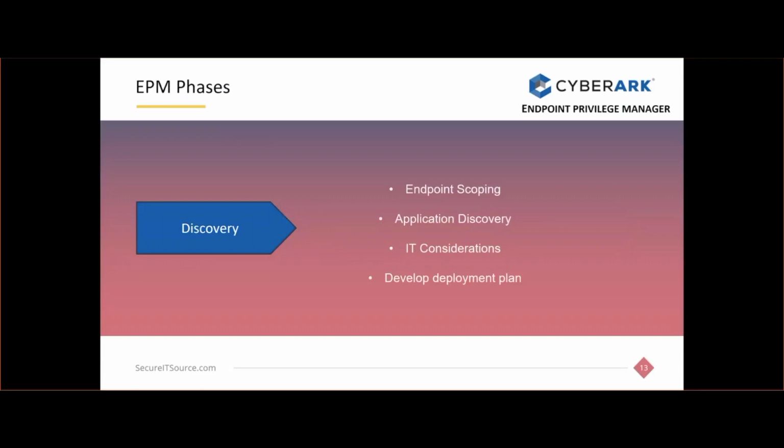We want to do application discovery, super important. We want to know exactly what is being used in the enterprise. A lot of folks are aware of maybe some high-level applications, but this is where we get into the weeds. EPM is going to gather all that data for us. And as I was just stating, 9 times out of 10, we're going to start in our own team. The IT staff is going to be accustomed to deploying applications and changes. So we'll work with those internal teams first before we move on from that point.